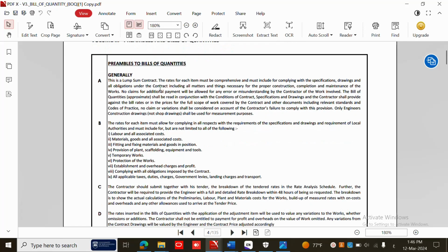Okay, so what else? The rates, but I will give you a brief about the lump sum contract. A lump sum contract is a contract that has a fixed price. I mean, when you're calculating your quantities and bid your prices, this is your final price. It can't be changed. Whatever happened on the site, if the quantity increased or decreased, that's not your problem. You have to stay fixed with the price you offered at the beginning.